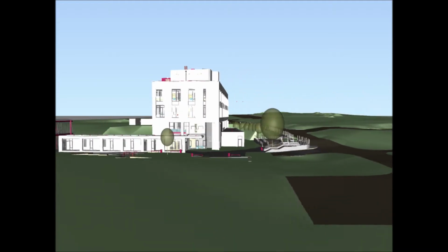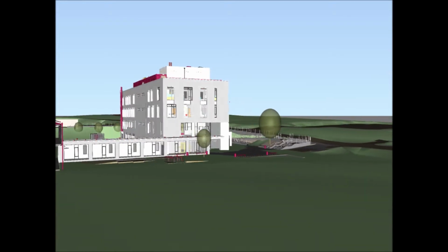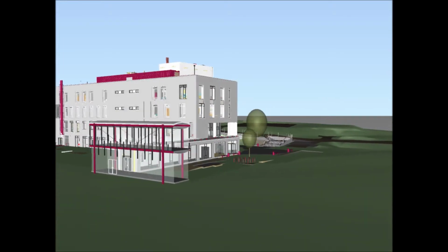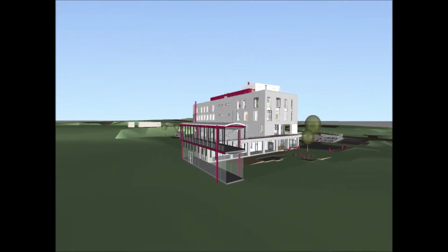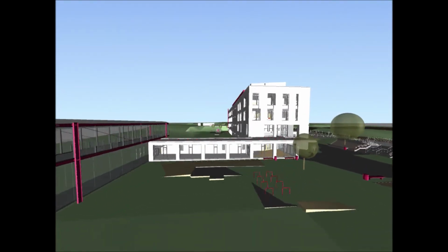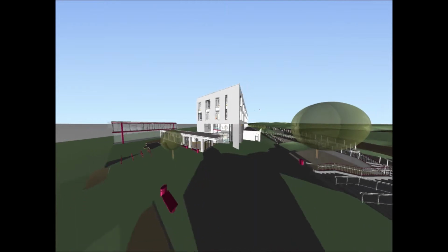The reason the full editable version has not been provided at tender stage is to protect the intellectual property of the design, but the preferred or appointed contractor will be given the full version to use, as they will be required to develop a construction and fabrication model during the construction process.